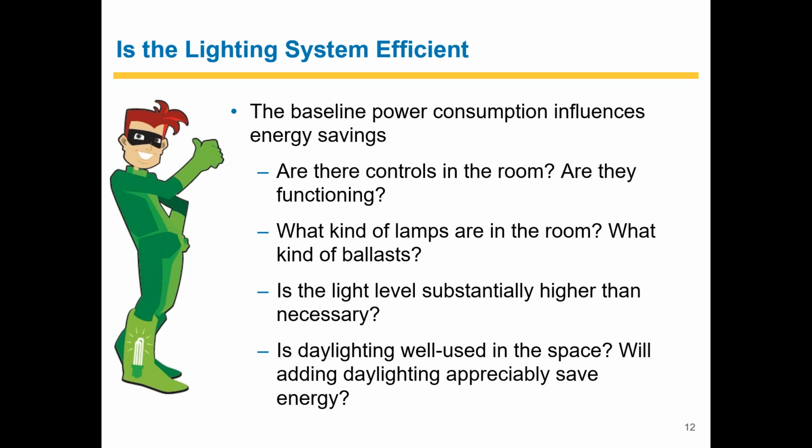And so we want to consider incorporating some easy functional tests into our strategies of doing lighting audits. So that way we can kind of assess, is this product working? Does it need to be replaced as part of the project? That's going to have a big outsized impact on your efficiency savings if the operating hours are substantially higher.